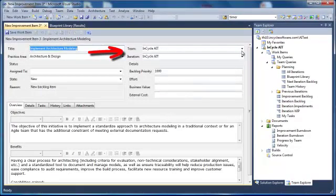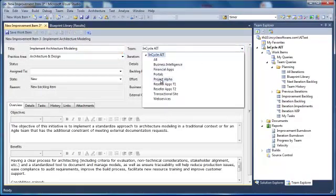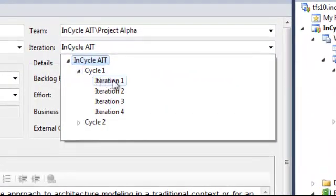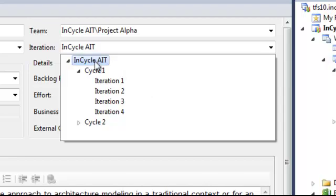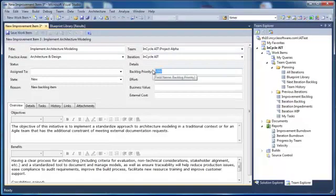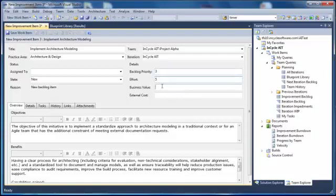You then specify the team for which the item applies. Next, select the iteration where it will be assigned. The InCycle ALM Improvement Framework suggests grouping iterations in Cycles. Cycles are used as an opportunity to reassess practices to refine priorities for future iterations. These reassessments also provide executives with visibility into the realized benefits of the improvement project. In this case, we are not assigning the improvement item to an iteration, so it will remain in the backlog. Before saving, we will complete the status information, prioritization details, and modify the inherited fields as necessary.